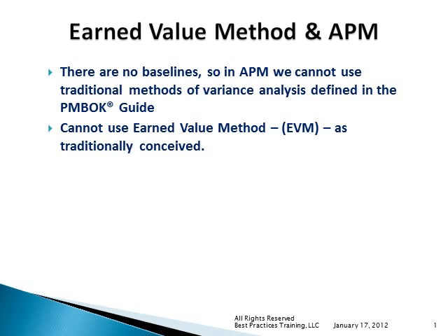And similarly, we've defined what the product backlog will be that's going to be achieved in each sprint. So we've got a scope baseline within each sprint, but we don't know how many sprints we're going to do. We don't know how many iterations it's going to take to get to where we want to end up at the end of the project. So therefore, we can't project out and have baselines for the project overall.